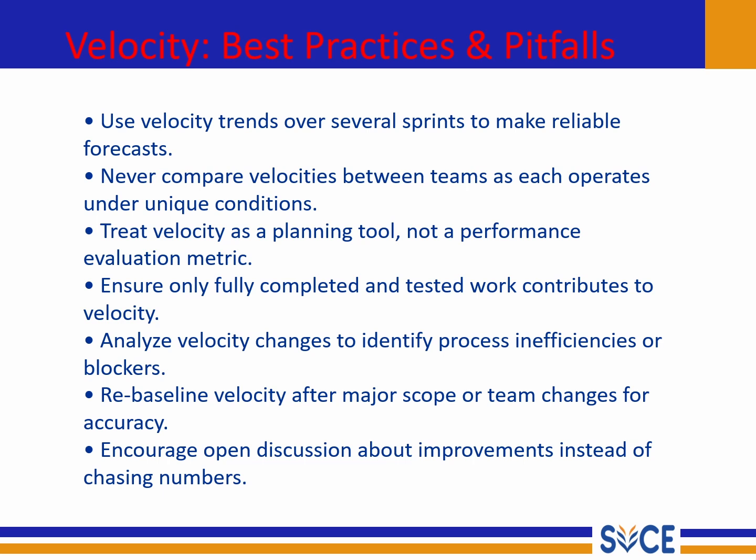Also remember that velocity is a planning tool, not a performance score. It is meant to help with forecasting, not to rate how good or bad a team is performing. When measuring velocity, make sure to include only completed and tested work. If something is not done or tested, it should not be counted.